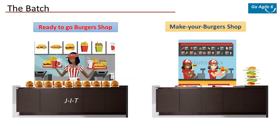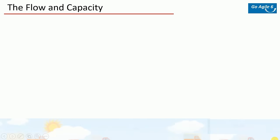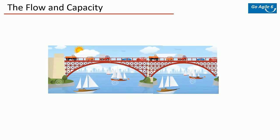Now let's look at flow and capacity. Imagine there is a bridge — at any given time there cannot be more than 100 vehicles on it. That's the maximum capacity. Technically you could fit 200 cars, but if you allow that many to continuously go, it causes chaos, traffic mess, delays, and accidents — which can even collapse the bridge. So never maintain at full capacity; you won't have a smooth flow.